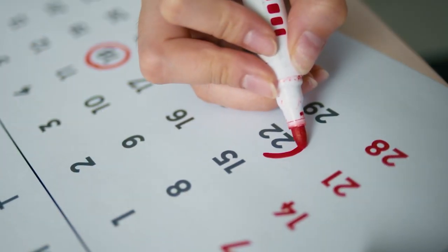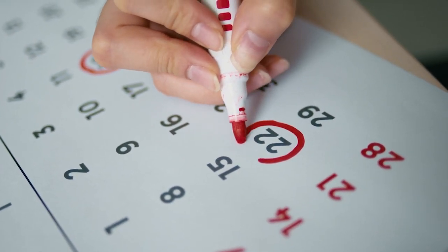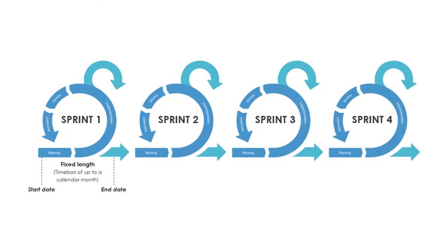Okay, so we've talked about the structure, but how do we manage and coordinate the work? Well, one way to keep your team on track is to work in short bursts or sprints. So instead of relying on the project's timeline and complexity, try running your project as a series of 1 or 2 week sprints. You can think of a sprint as a mini deadline where you need to produce and share a piece of work before the end of that deadline. This is of course not a new concept. A lot of traditional startups have been using this approach as part of Scrum and Agile project management frameworks for a very long time. But guess what? It actually seems to work pretty well in DAOs too.